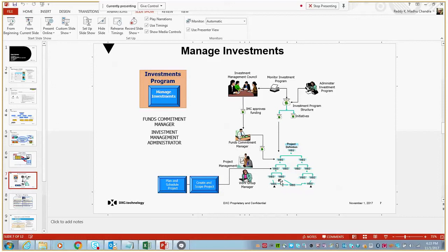Service, in the sense, is a project that exists for the purpose of servicing equipment that may be on a customer's site, and billing of the customer could be done by resource-related billing, where CATS timesheets and other actual costs can be transferred to the customer invoice. PS supports the various project phases, including project structuring, definition, planning, execution, and monitoring. PS is nothing but managing projects and reporting projects in financial areas.